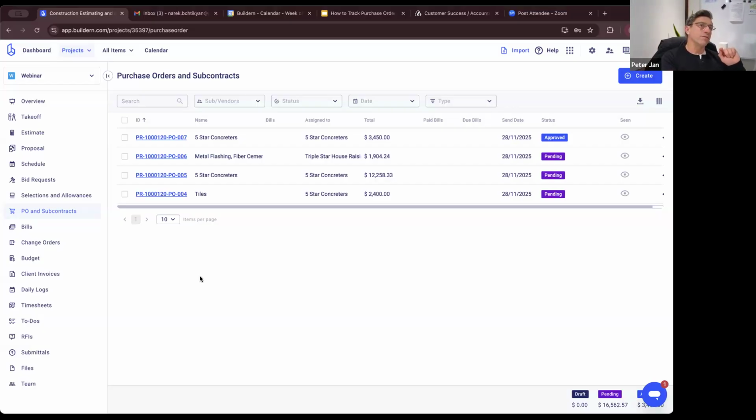But if you don't put all the materials in the actual estimate, you cannot generate the purchase order properly, because the purchase order doesn't know what's included in it. You'll generate it, but with just that one line, and it's not recommended. You cannot order from that. That's what I'm trying to say. So what you could do in that situation, Peter, is we have what we call assemblies, essentially.